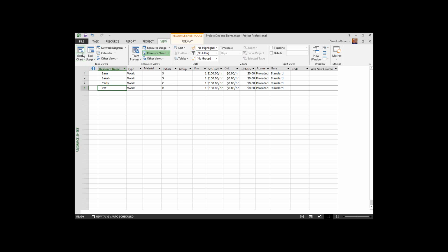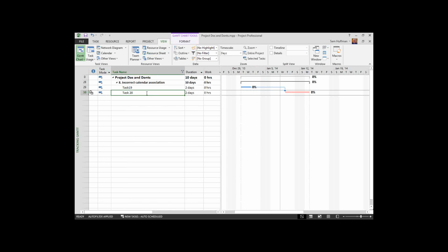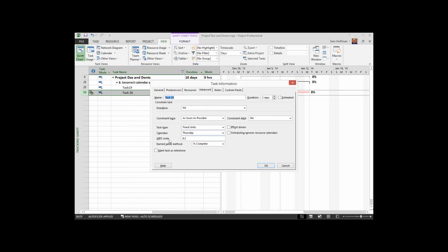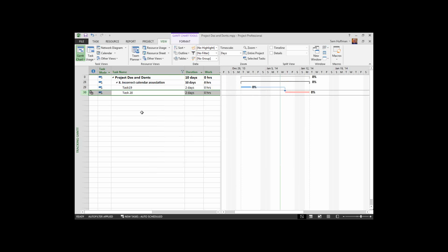The last thing we looked at, the task calendar, can overwrite and become the trump card. This is the one that can completely trump all other calendars in any kind of conflict. So with that in mind, as you begin to use the product more, be aware that if you have a mismatched calendar, or incorrect calendar association, it's very possible that your schedule can be undermined and maybe not even tenable anymore. I'm sure we'll have some questions on that one.